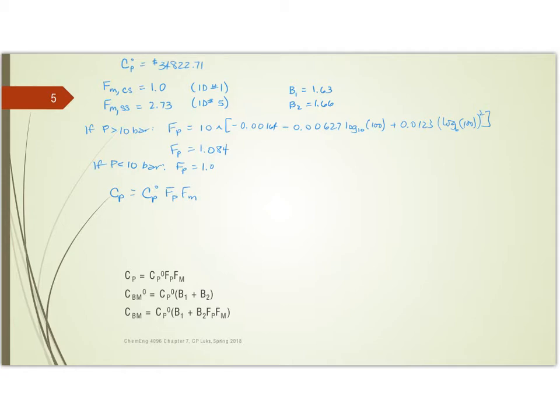C sub P is C sub P0 times Fp times Fm. The bare module cost, it's going to be C sub P0 times B1 plus B2 if it's just carbon steel at one atmosphere, or B1 plus B2 times Fp times Fm for a different pressure or material. So, let's now use these and run these calculations for our various cases.